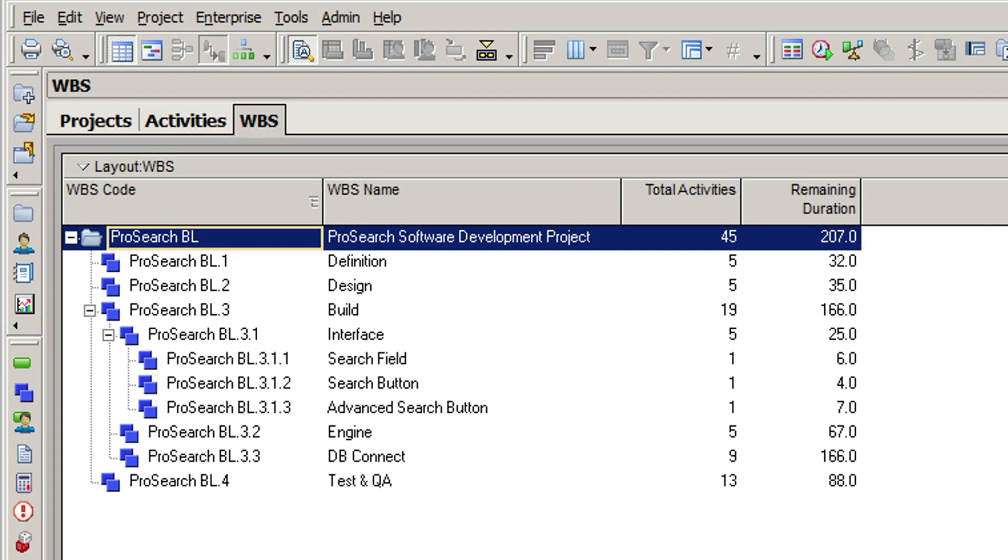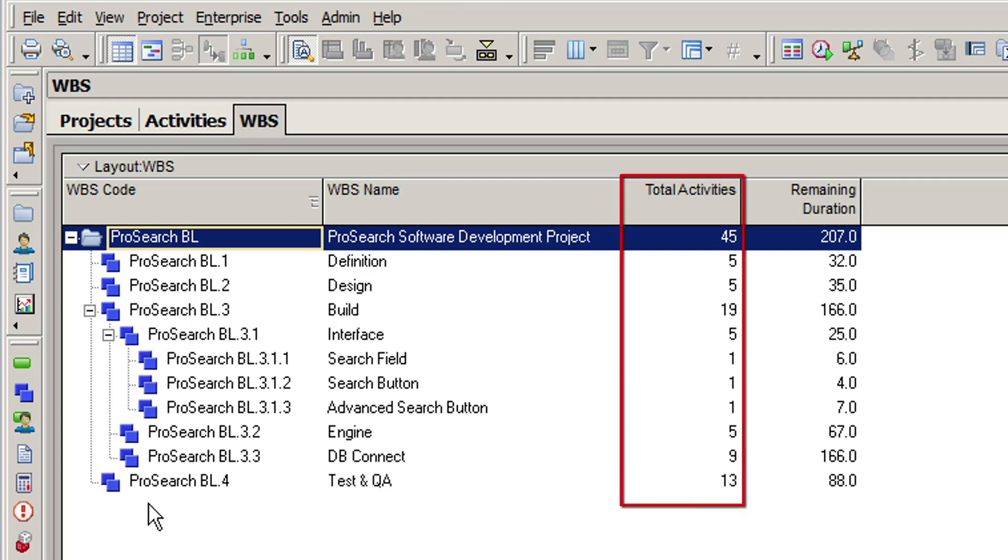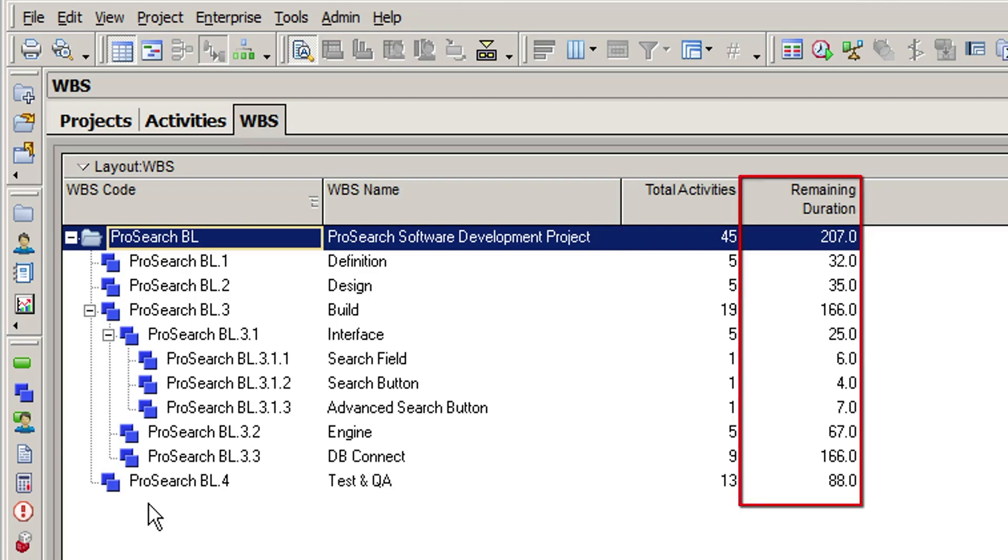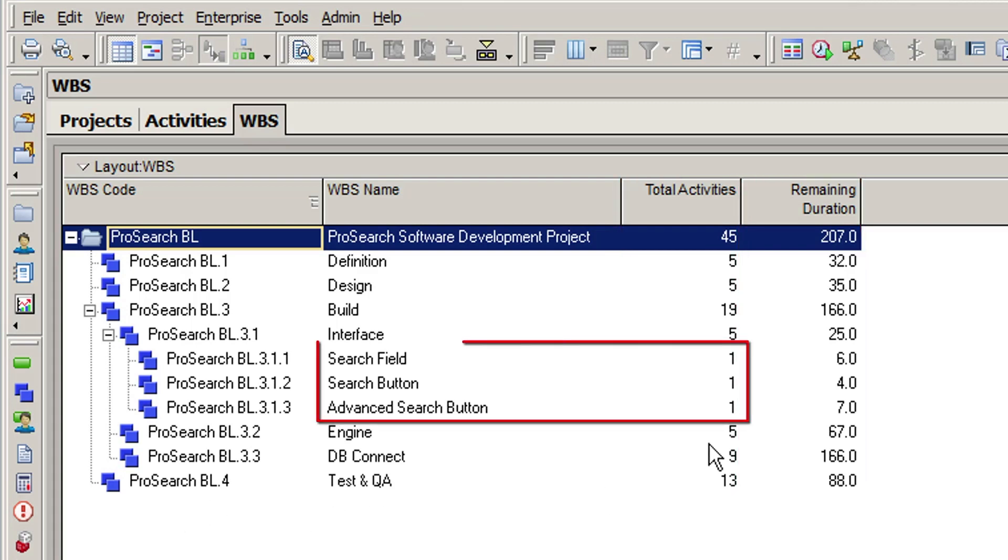In P6, we can see that the schedule has been broken down to a fourth level of WBS detail below the interface element. Note the total activities and remaining duration columns. Search field, search button, and advanced search button show just one activity below each element.